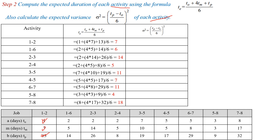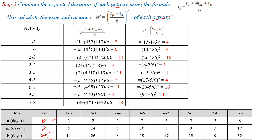Activity 7 to 8 TE = 18. Next, find sigma squared for all activities using sigma² = ((TP - T0)/6)². For activity 1 to 2: (13-1)/6 = 2, squared = 4. Similarly: 1 to 6 → 4; 2 to 3 → 16; 2 to 4 → 1; 3 to 5 → 4; 4 to 5 → 4; 6 to 7 → 16; 5 to 8 → 1; and 7 to 8 → 16.